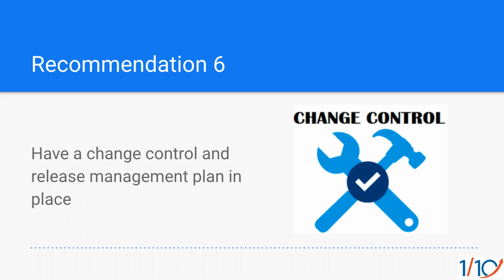And we can talk more about this, but this is typically like, have a clear mechanism for intake, whether you have some sort of help desk software or even just a shared Google spreadsheet, doesn't matter. Have one place where people can enter all their feedback, have an internal process for how you prioritize these things. There's a break fix or something that is impacting reporting might be one thing, whereas a data issue might be prioritized another way, and an enhancement request might be prioritized another way.